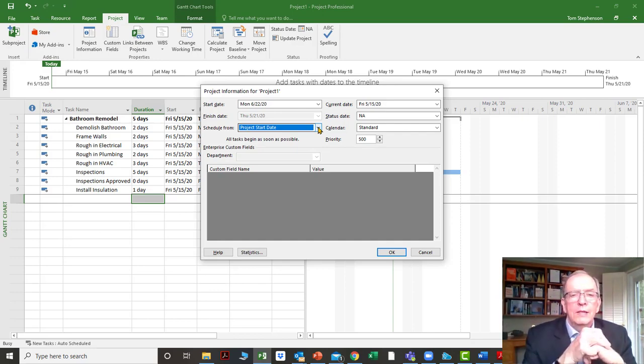You'll find that scheduling from a finish date, maybe if you're a wedding planner or something of that nature, you might want to think about it in those terms, that you've got the hall rented on that date. But other kinds of projects, IT projects, construction projects, what have you, we schedule from a project start date, and then we see where it lands. If we're not happy with the finish date, we adjust things so that we can make it finish on that particular date. So we look at it if it's possible.